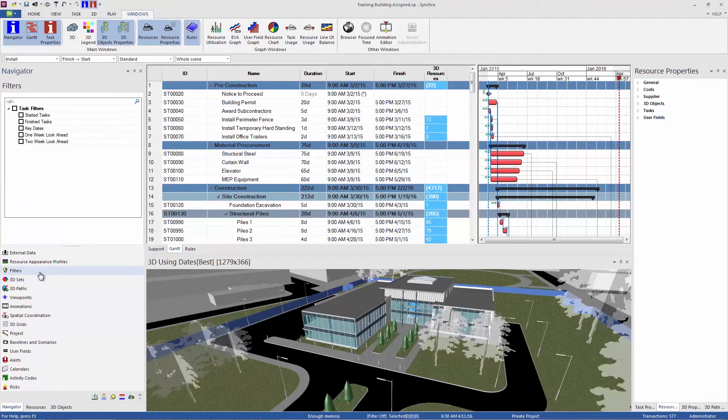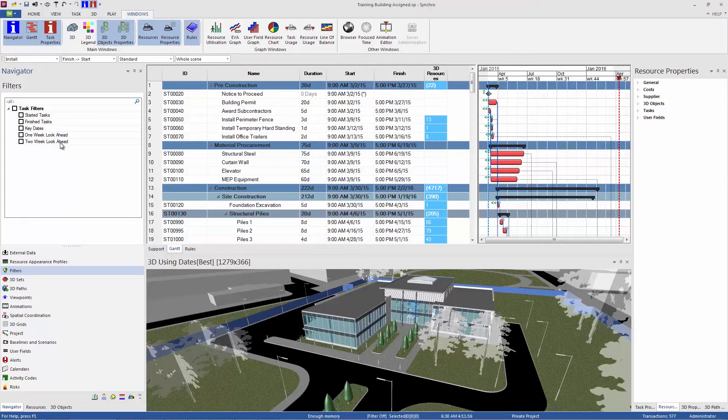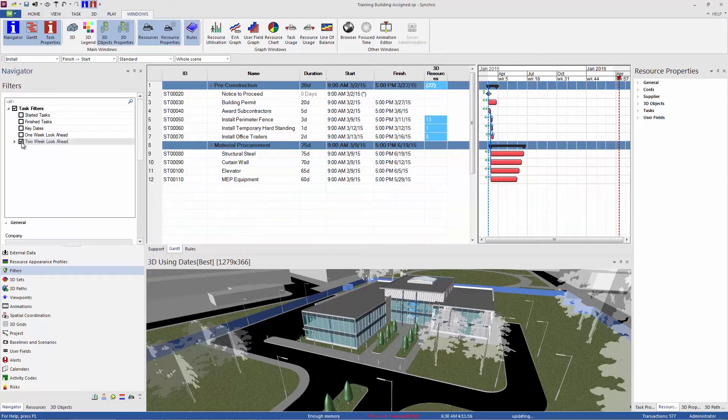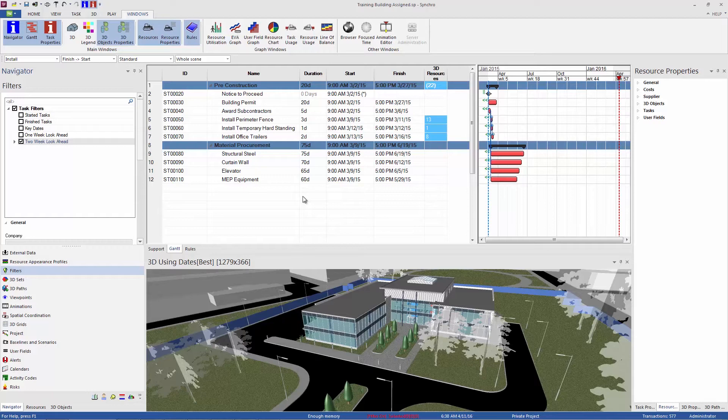So I'll start today talking about task filters. You can see here listed the built-in filters: started and finished tasks, key dates, and a one and two week look ahead. Any of these filters are activated simply by left-clicking to check that box. So now we have a two-week look ahead in our task list. You can see there's a lot less tasks than there were before.